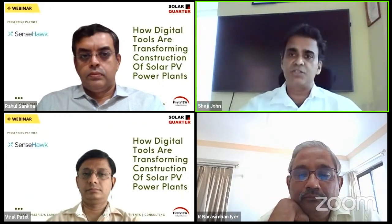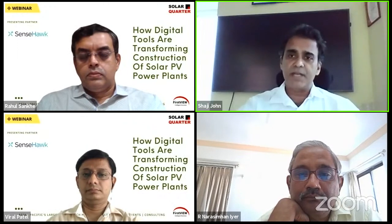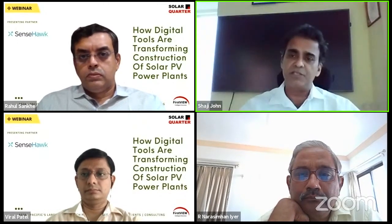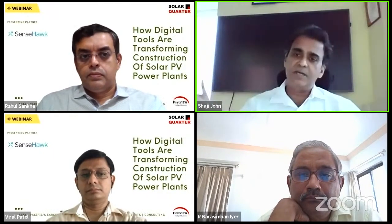Third is our digital stores. Basically, to track the materials which are required for certain work packages, and maybe contractor-wise, how much material has gone and how to do the reconciliation. So they are also digitalized in many of our project sites.